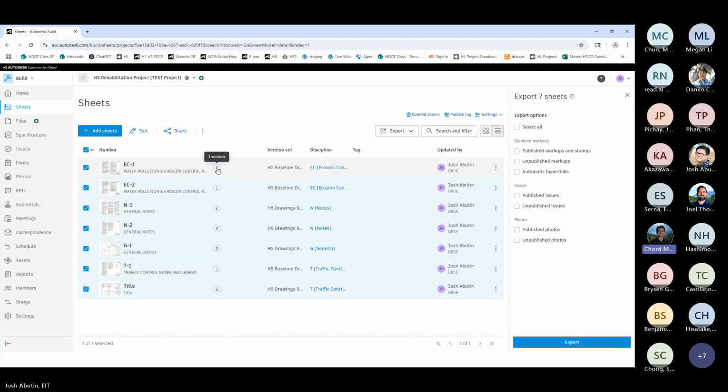So your project sheets will automatically show up in the other project when it's created and bridged, and you can set it up so that when your original baseline project adds field order or change order sheets, they'll automatically go to your as-built project, or your personal as-built or contractor as-built, and so forth. So I don't think there's any concern about duplication of work when utilizing ACC bridges.